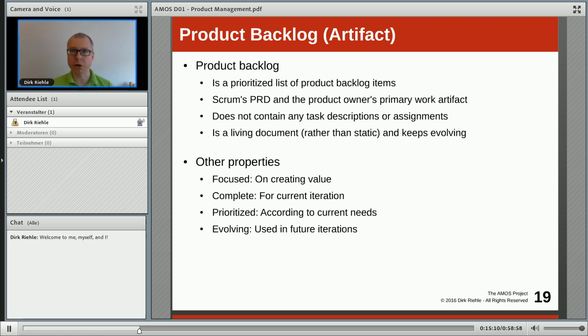It keeps changing because product owners work with it, as functionality gets implemented, it is moved out of the product backlog into the sprint backlog, awaiting implementation, and into the feature archive once it has been done. The focus of the product backlog and its entries is business value.